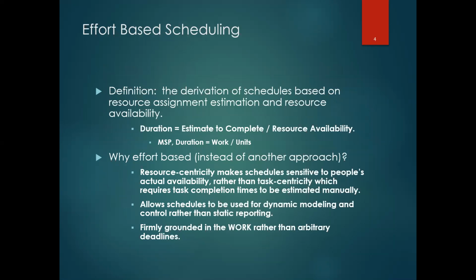So what's the definition? The definition of effort-based scheduling is to derive schedules based on resource assignment and resource availability. If you look at the underlying calculations that these tools use, and this may be old hat for many of you, but it's always good to kind of revisit it. Within Open Workbench, duration is a function of the estimate to complete divided by resource availability.